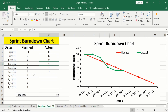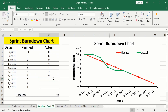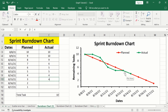Assume that we have completed another task on this date, so remaining tasks will be 4. On the next date, we are not able to complete any tasks, so remaining tasks will be 4. When these lines overlap, it indicates that we are working according to our plan — neither behind nor ahead of the timeline. In the actual work column, you can enter the value of remaining tasks and Microsoft Excel will generate a sprint burndown chart accordingly.